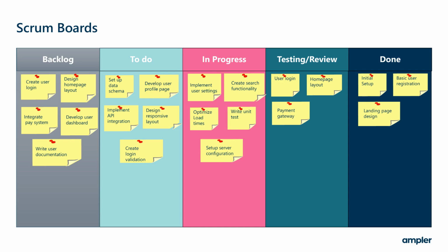Tasks that are not currently being worked on are kept in the Scrum backlog, out of focus for the time being. Another key feature is the increment, which is the specific deliverables the team aims to complete by the end of the sprint. While Gantt charts provide a structured and detailed plan, with some flexibility, Scrum boards enable teams to adapt quickly to change and obstacles. This makes them particularly effective for iterative and agile work, where the team cycles through the same processes repeatedly and where change in plans happens frequently.